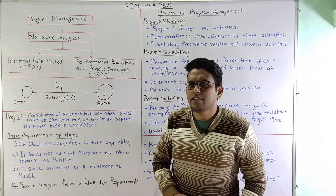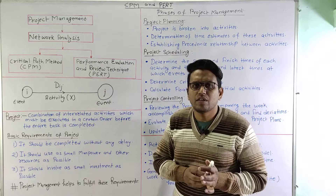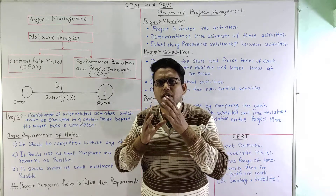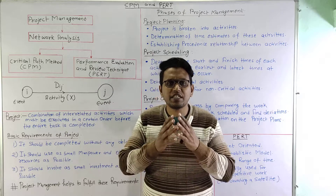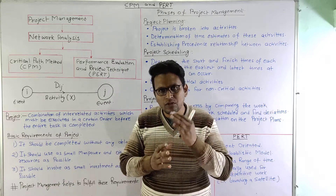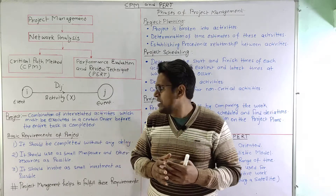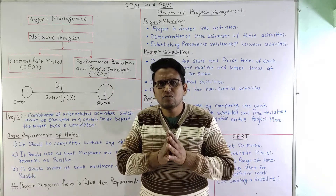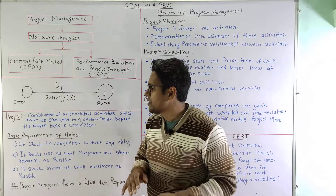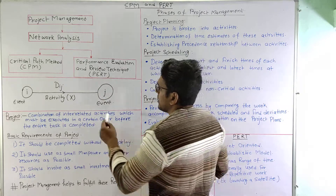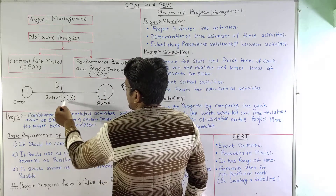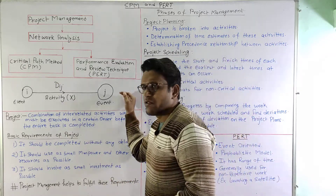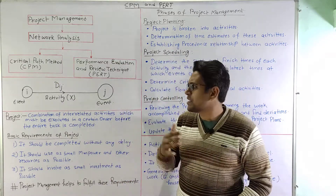The third term is network. A network is the graphical representation of logically and sequentially connected arrows and nodes, which represent activities and events. Networks are also known as arrow diagrams. By combining various activities we can form a network. These are the terms we are frequently going to encounter.